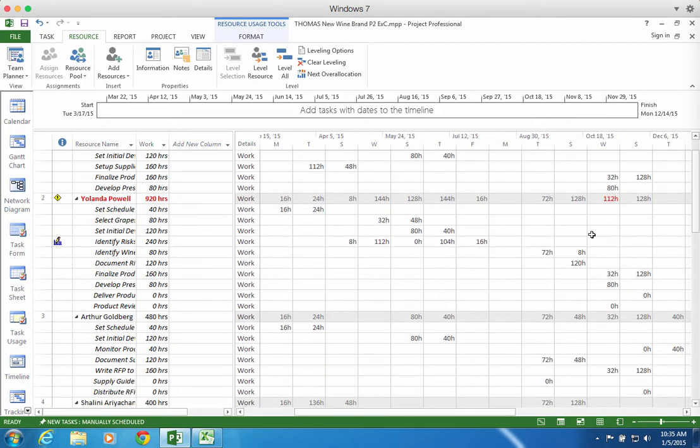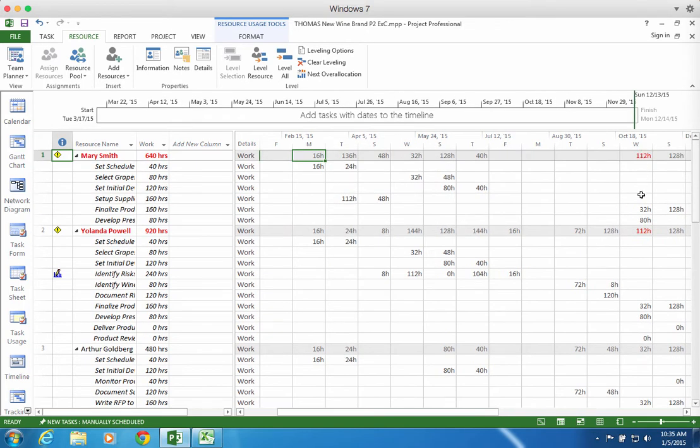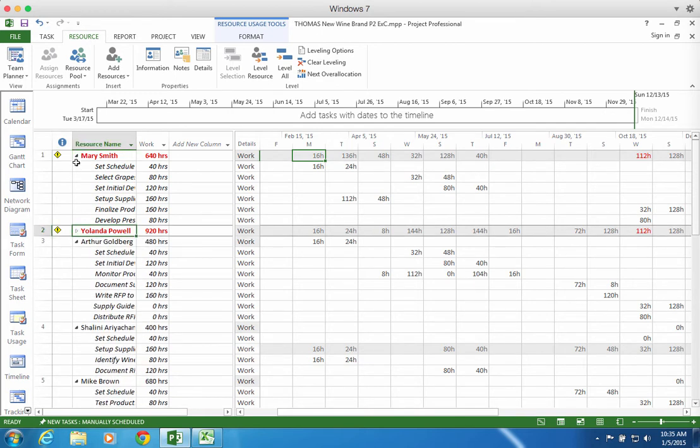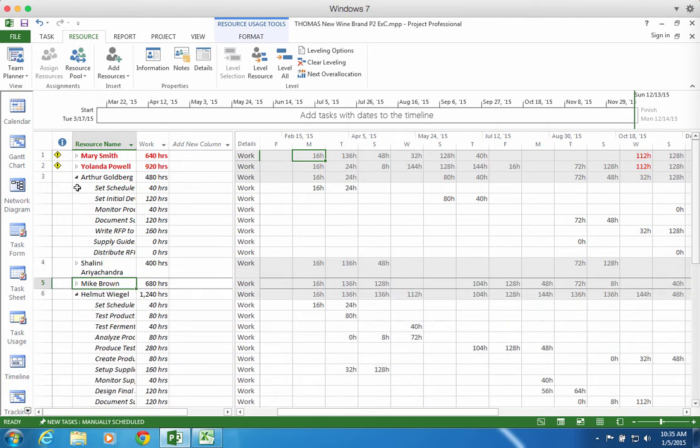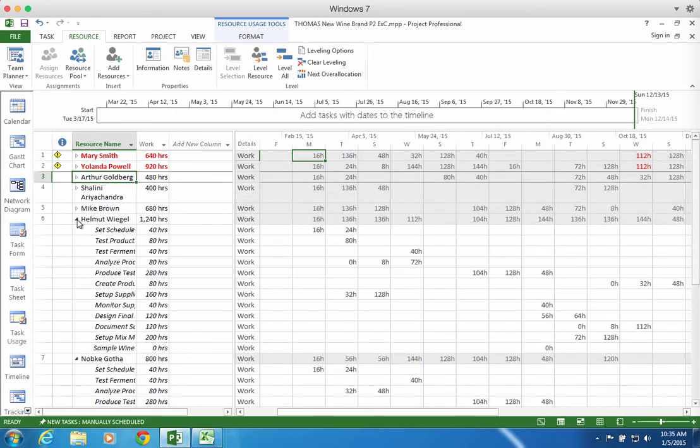At this point, they're happening in October, and they're happening during what looks like a week when Mary and Yolanda would be working 112 hours. I can see exactly which tasks are involved. Nobody else is involved at the moment.